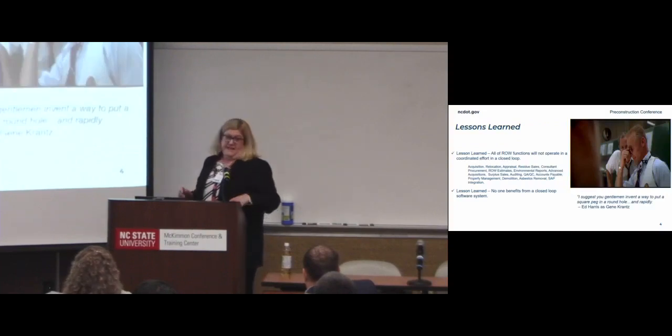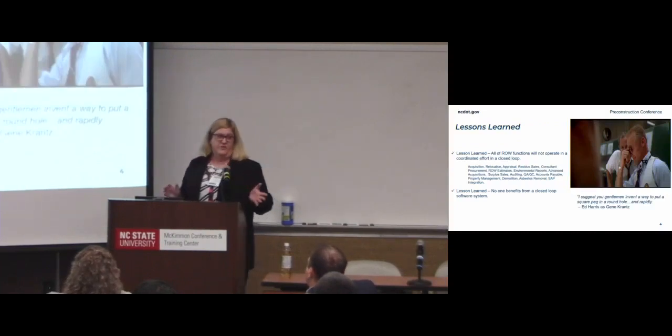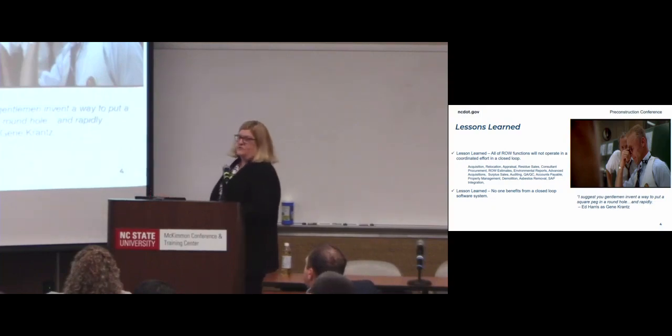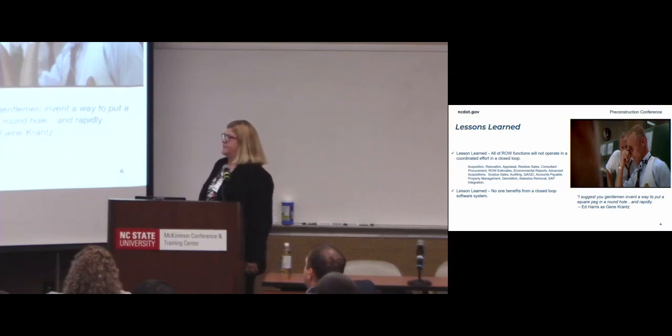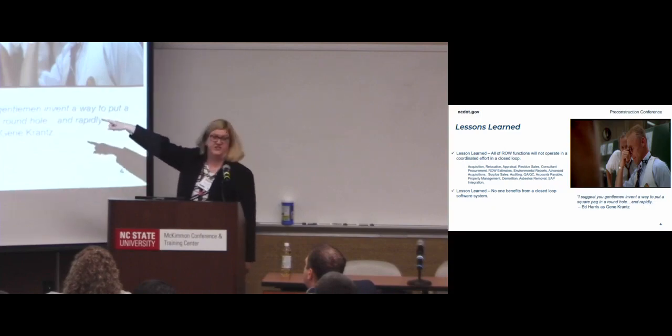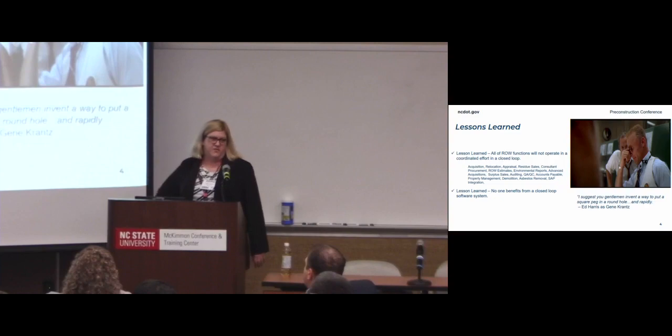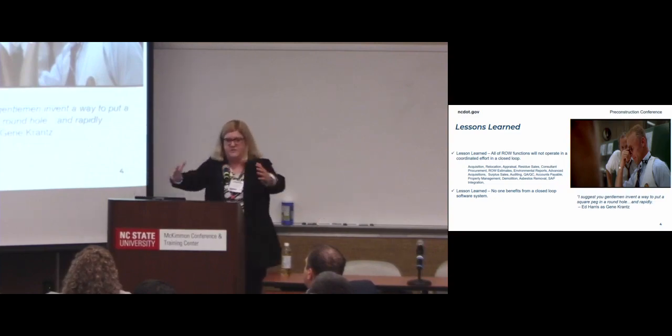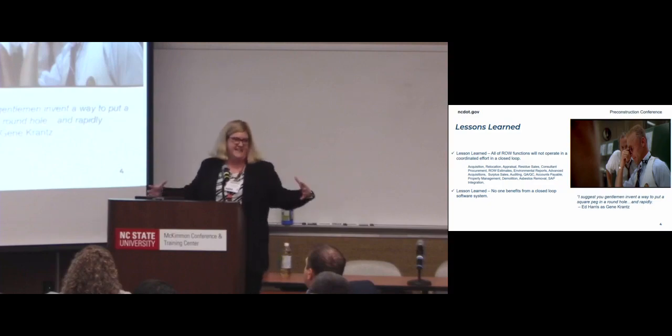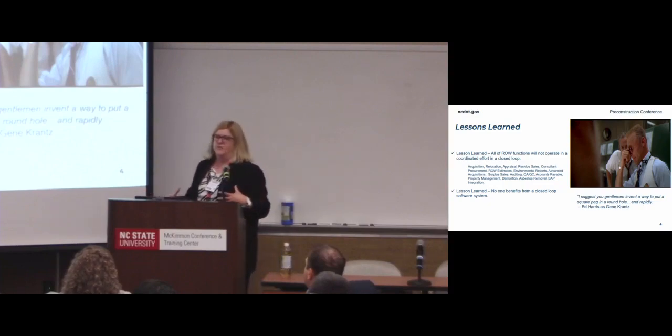So we kind of did some, what went wrong? What are we going to do now? So one of the things we realized real quickly with our lessons learned is that all of the right-of-way functions are not going to operate in a coordinated effort in a closed loop because this is just a portion of what they are. And so that was part of what our problem was. We had so many things going on, and you're just trying to cram them into one thing and say, let's make it work. And what we found out is that it did not work.